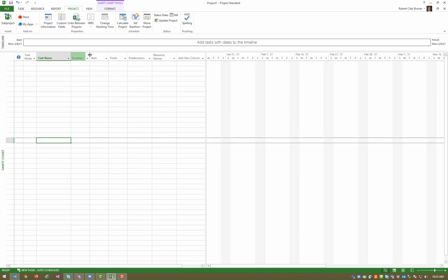One thing you never want to do is put a date into your start and finish times. You never want to manually input a date. You want the dates to work themselves out based on the connections that you put in there, your predecessor and successor connections.